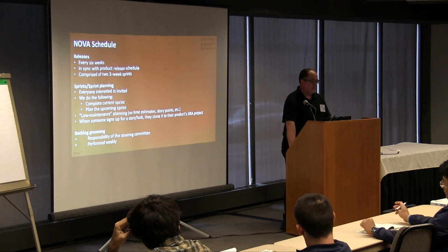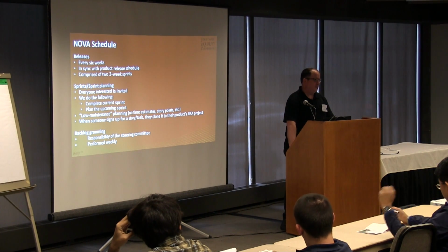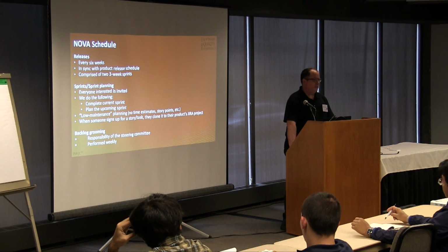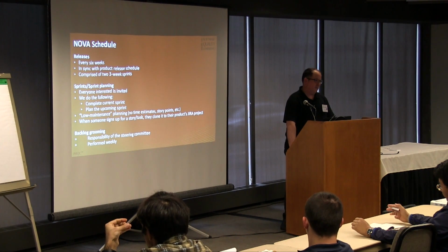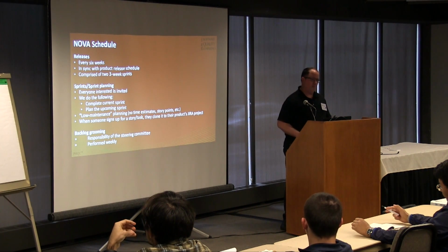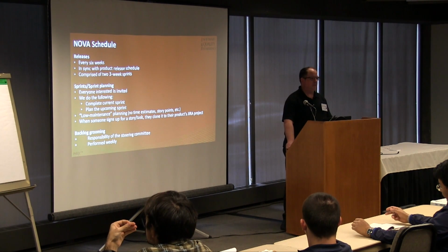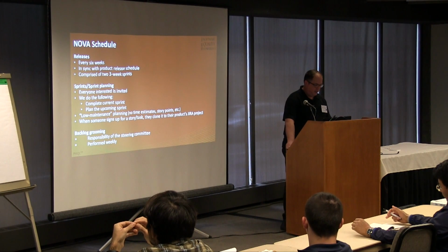As far as grooming the backlog, the steering committee does that. We usually do it weekly. We just take a look at the backlog, make sure that there aren't any more stories that need to be added, and anyone can add stories to the backlog also. If you're an engineer on a team, you just think, wow, this would be a really cool idea, add a story to the backlog, and we'll take a look at it. So it doesn't mean someone else will work on it, but we'll at least take a look at it and see if it's worth considering for the next sprint.